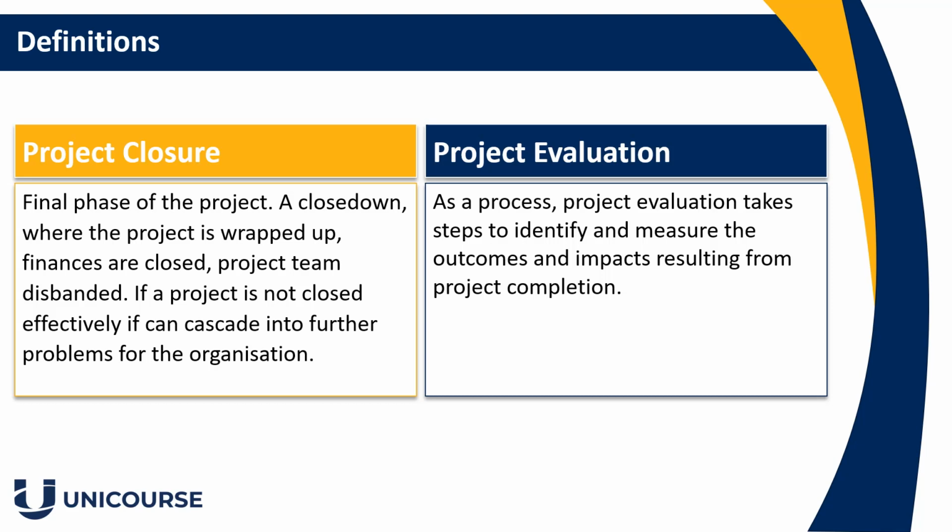But it is vital to have a close down protocol in order for a project evaluation process to be streamlined and successful. So the project closure is the final phase of a project. It's a point where contracts are closed down, and it's basically about closing everything off. Whereas the project evaluation will really delve into what went well and what didn't. So let's talk about that a little bit more and how we can use tools and techniques to help in that process.